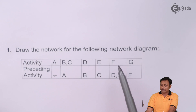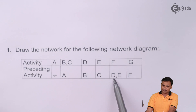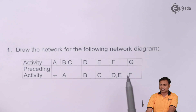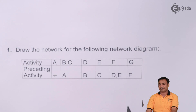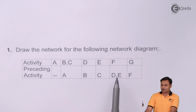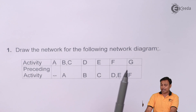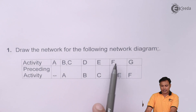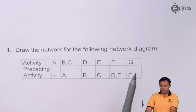Then we need to join D and E. Be careful — we need to join D and E in such a manner that after the completion of both D and E, we have F, and after F we have G.